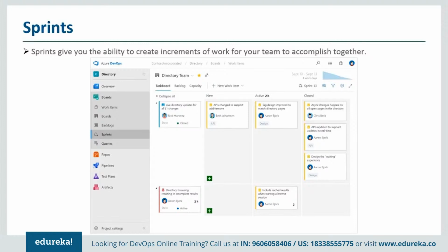In your e-commerce application, say we want to deliver the checkout functionality. If you are ready to deliver the checkout functionality in 2 weeks as part of the sprint, your checkout feature or checkout epic will go inside that particular sprint. Once it goes inside, the whole team starts working towards that area and tries to complete all that stuff during that 15-day time box window. That is what you can build as part of the sprints.